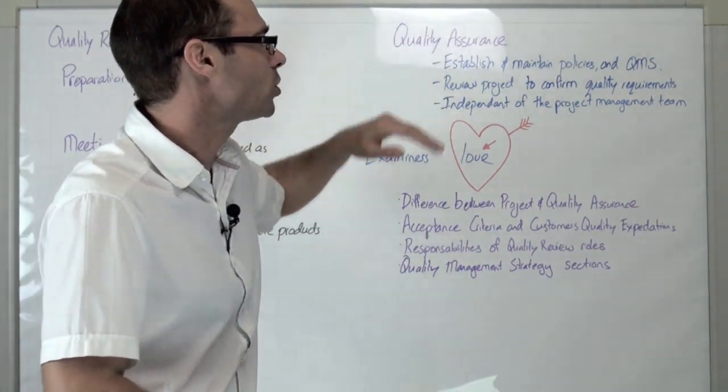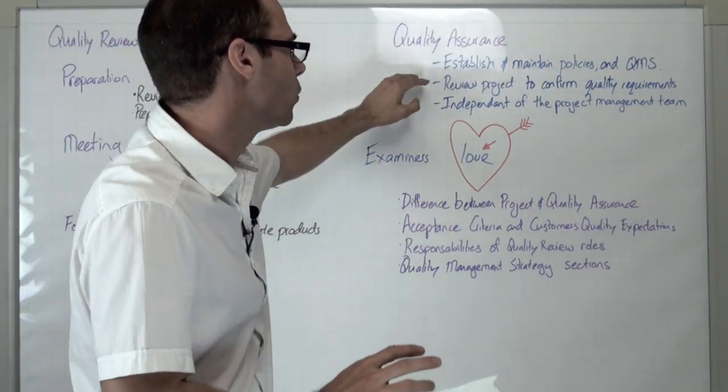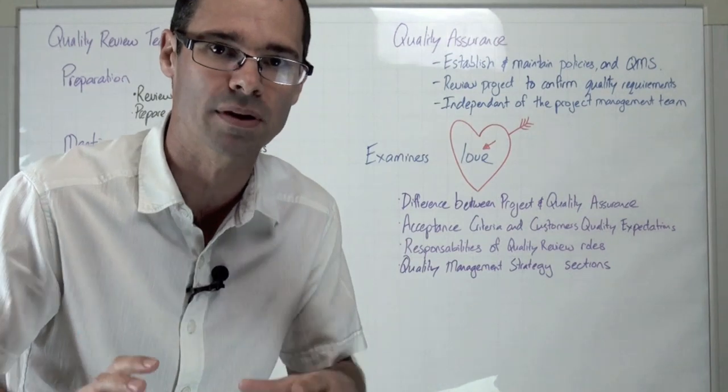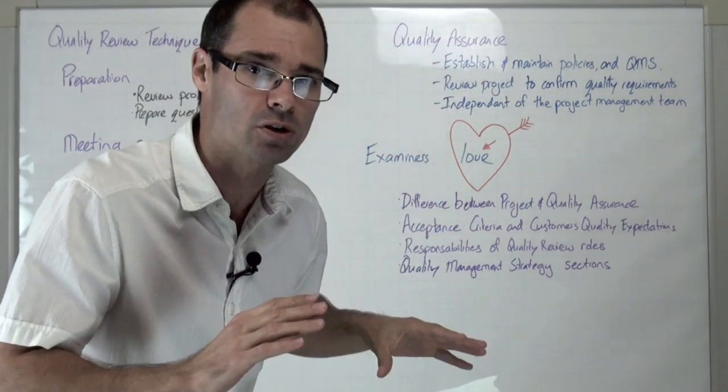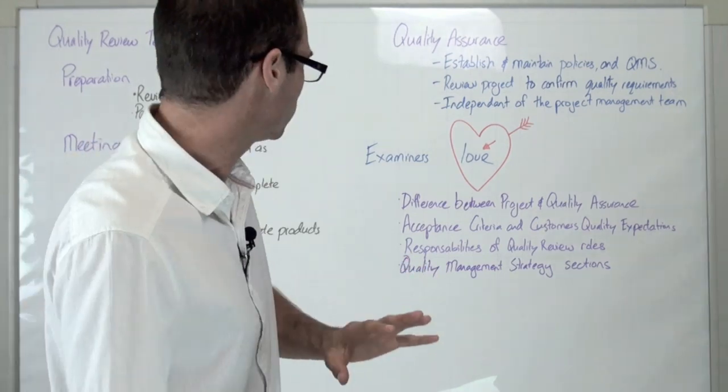Quality assurance is about establishing and maintaining the policies and the quality management system. It's about reviewing the project to confirm the quality requirements, and it's independent of the project management team. It often comes from corporate program management outside of the project.